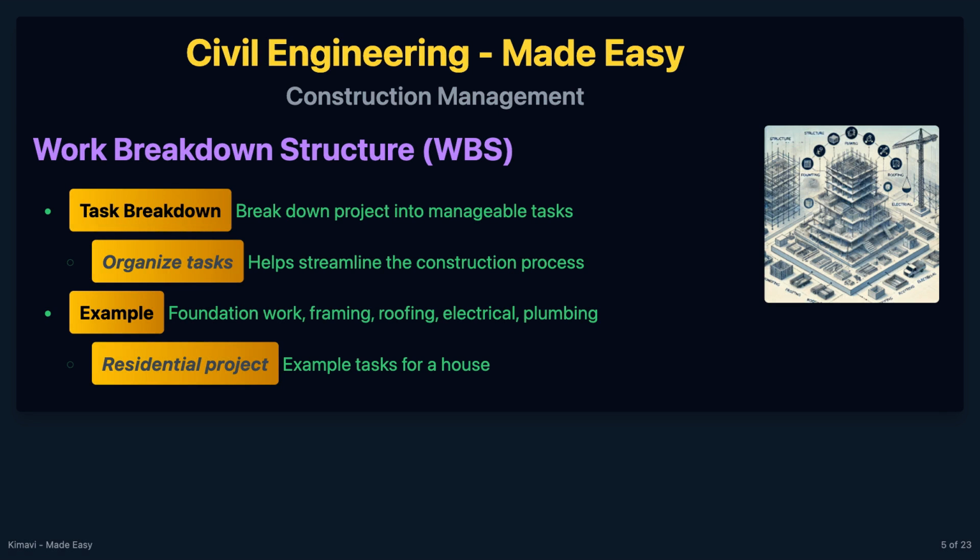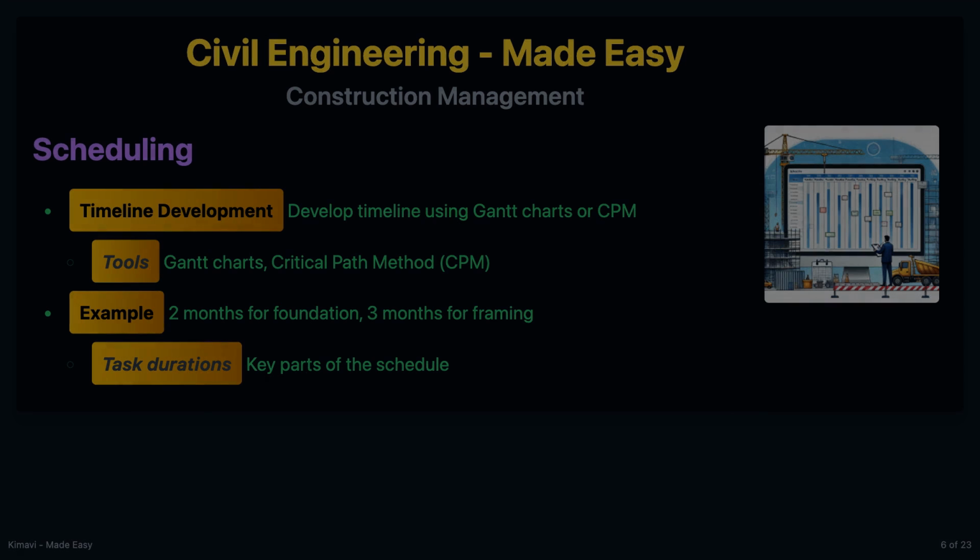Next, we have the work breakdown structure, or WBS. This involves breaking down the project into smaller, manageable tasks. For instance, in a residential building project, tasks might include foundation work, framing, roofing, electrical, and plumbing.